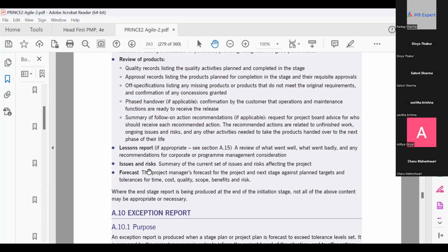No, not future risk. I'm talking about the past risk that we have handled or that we couldn't handle. The past risks and issues will be in the risk register and issue register, and they will be part of organizational process assets. Anybody who wants to refer can refer to them. Organizational process assets are like an organization knowledge base. Correct.